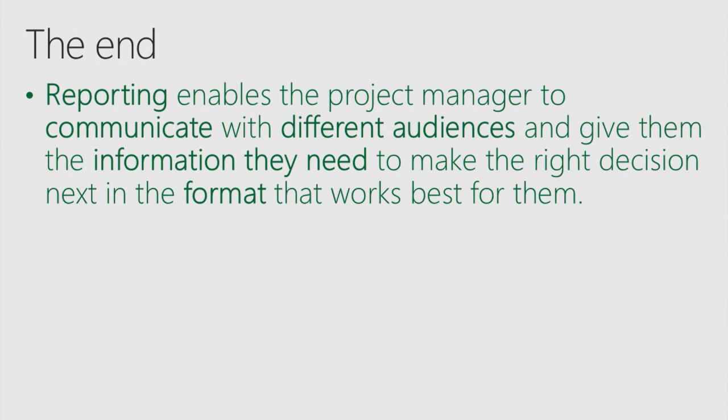Yep, all of it. So the question was, those cumulative time-phased work and task baseline fields and actual fields, are they available elsewhere? Yes, they are. Right-click in an assignment view, and you'll be able to see them. So task usage or resource usage, those fields are there. Absolutely. You can use them everywhere.